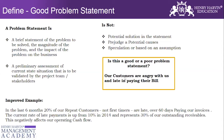The earlier problem statement — 'our customers are not happy' — does not define which customers we are talking about. Is it repeat customers or all customers? It doesn't mention why they are not happy, what the key issue is. The improved statement specifies the late payment issue, shows that the rate has grown from 10% in 2014 to 30% now, and mentions the impact: it negatively affects operating cash. This is a good problem or opportunity statement for us to proceed.